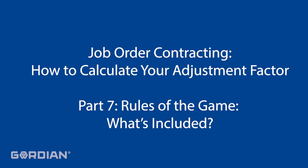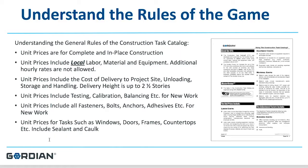Understanding the rules of the game is one of the critical aspects of successfully bidding on a job order contract. Be certain to read the very front section of the price book known as 'Understanding the Construction Task Catalog.' This section will explain that the unit prices are for the complete and in-place construction of the item. The unit prices include local labor, material, and equipment. Additional hour rates are not allowed in any proposal.